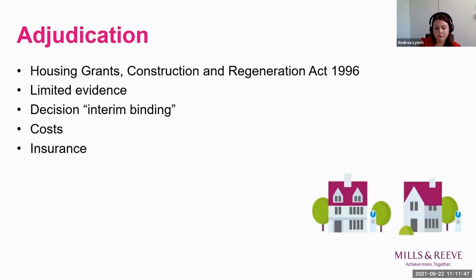duties? Yeah, thanks, Andrea. You're right. The timescale is incredibly short. The answer is start to finish, absent any agreement to the contrary, within 28 days. And I think one might question, with some legitimacy, how an adjudicator can properly assess the sorts of things which are necessary to resolve many professional negligence disputes in a construction sphere.